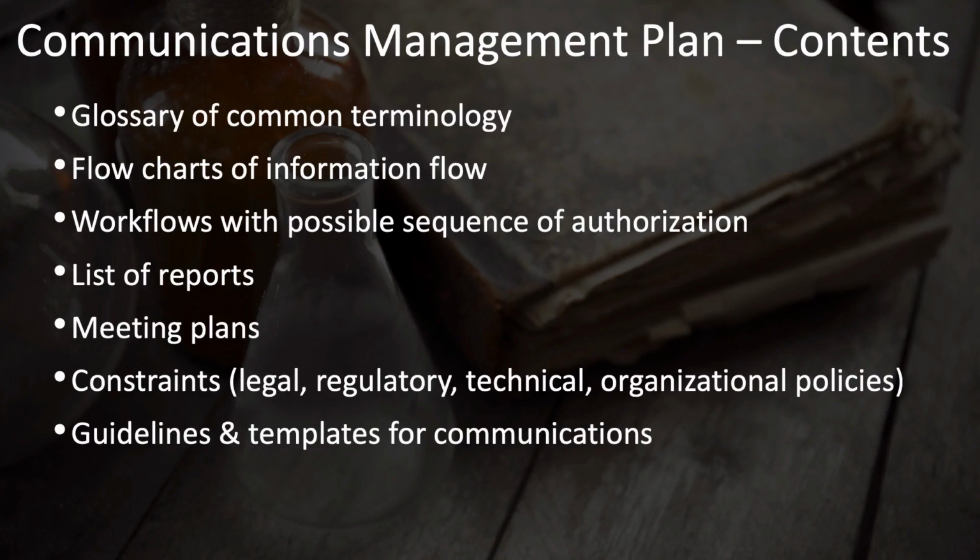You may also have other constraints on your communications, such as legal or regulatory constraints. You may have government inspectors that need to come and inspect your work, or others that need to be informed and kept up to date. You may also have some technical requirements that may go along with your quality plan of things that need to be communicated. And of course, you may have your own organizational policies that constrain your communications.